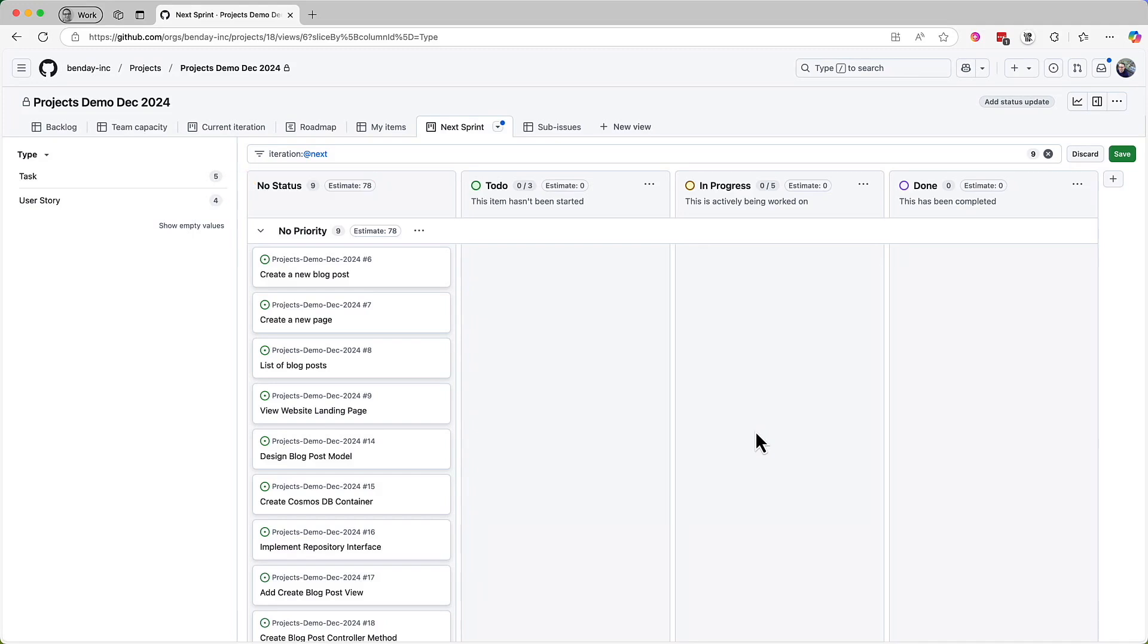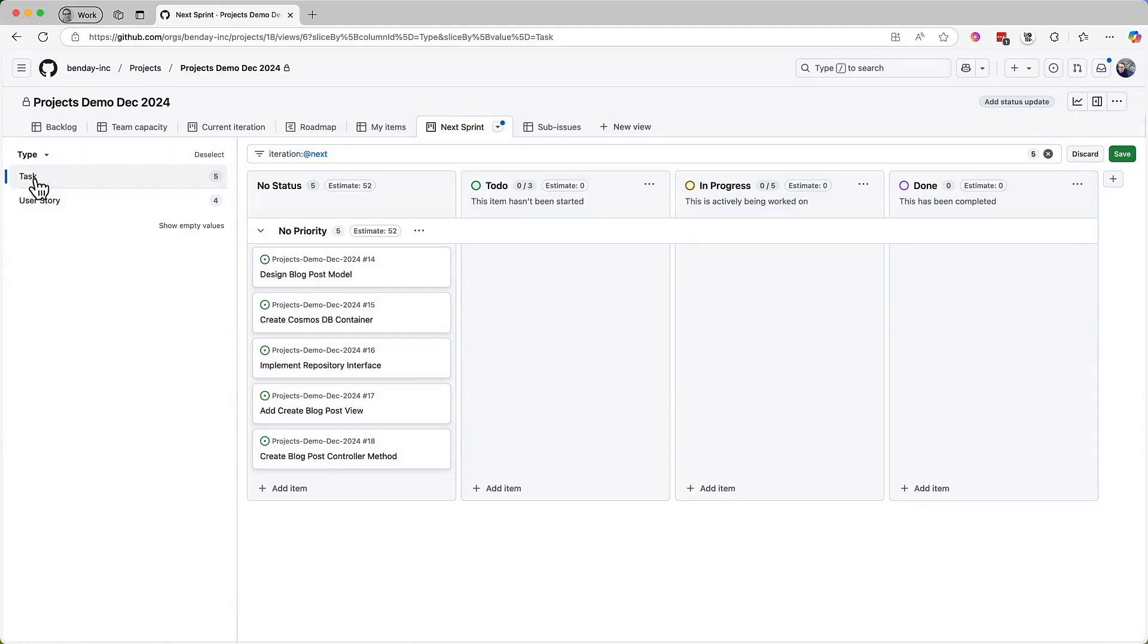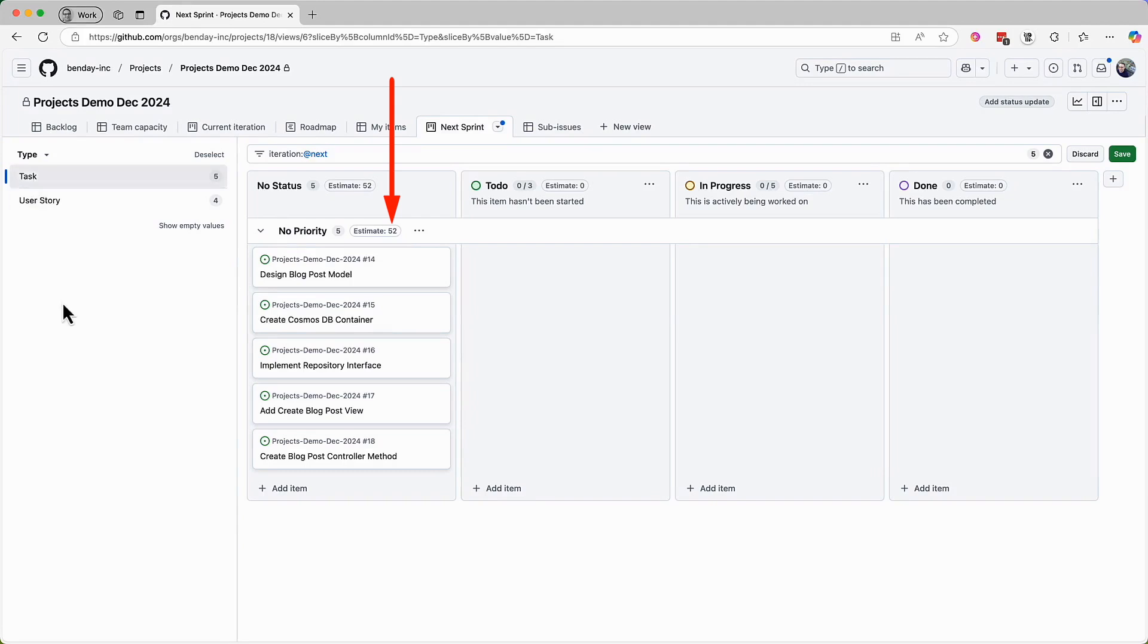Remember, product backlog items, PBIs and user stories are all basically the same thing. If we click on task, we see just the tasks. I'm not sure if this is a view style that I'd use a lot, but one thing that's interesting is that it's changed the estimate total number. It's now totaling up the estimates to show us the total number of hours for all the tasks in the sprint. Knowing the total number of hours, the total amount of remaining work in your sprint for the tasks that you've created so far, knowing what that total is can be really helpful during sprint planning because it can help tell you or give you an indication about when you might have too much stuff in your sprint.